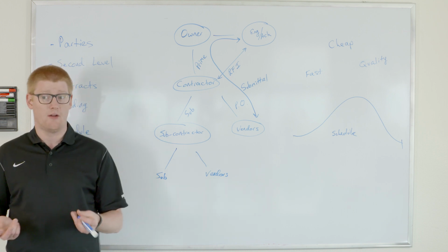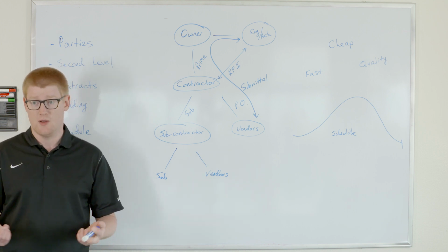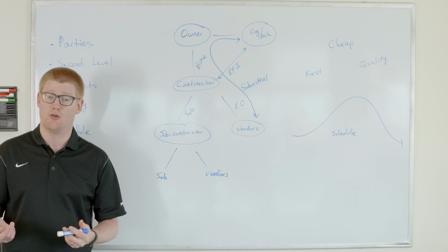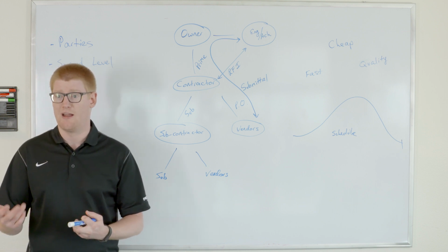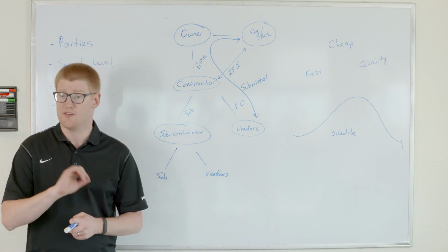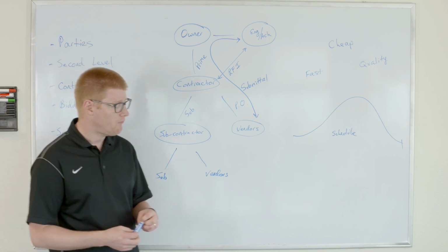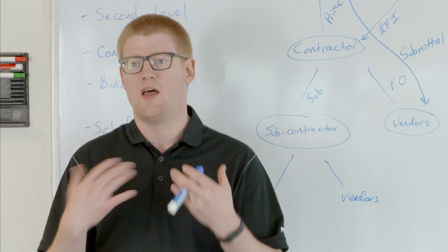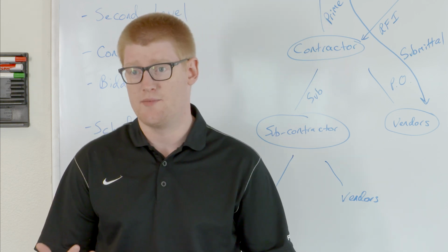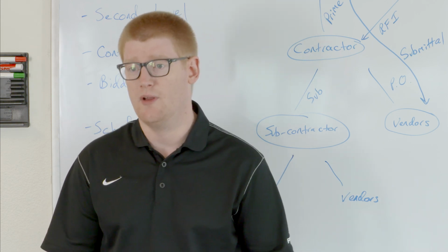But that said, we still handle transmittals whenever we do hard copies. So perhaps at the end of a job, when you turn over O&M manuals, stuff like that, to the owner, you'd most likely do a transmittal to say what was given. And so you certainly would still be creating those. And so there's a lot of other things and a lot of other areas on a job site where Procore can really provide a lot of value.